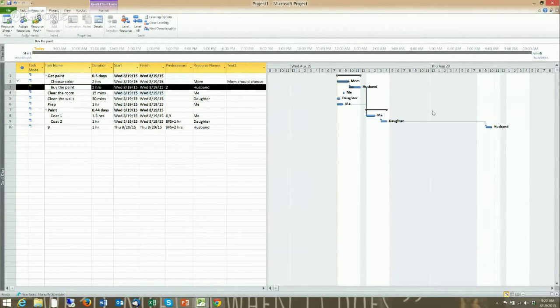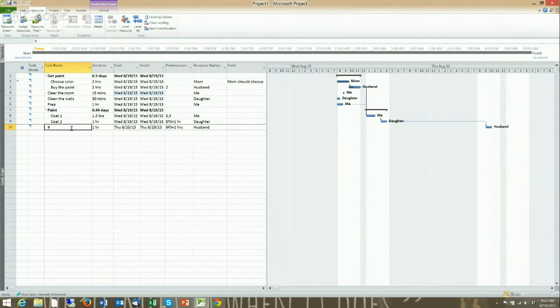And so what it does is it goes through and makes sure that no one is overscheduled, and it reschedules the tasks. Now you see what's happened here. It's because I haven't put in these dependencies. These things are going at odd times. So your dependencies, you can see in any project management, are really important. So be sure to use them.